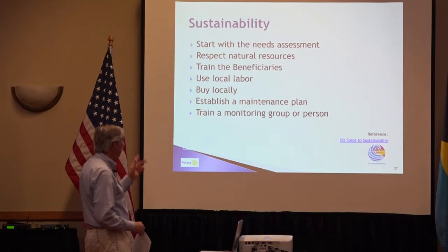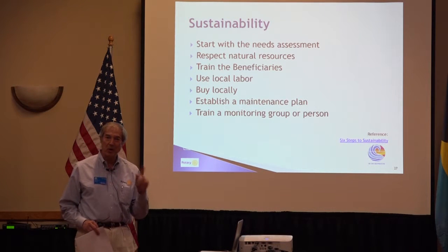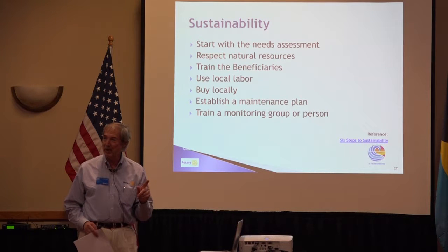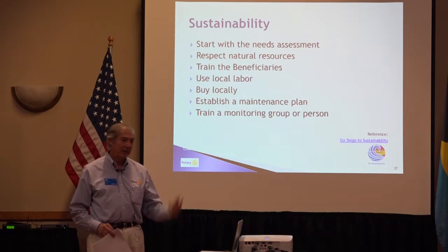And so training somebody to actually go and see that it's starting to slow down. It doesn't pump as fast as it used to. There must be something wrong with the impeller. We need to start making arrangements to get somebody to come and fix it before it breaks. Anyway,